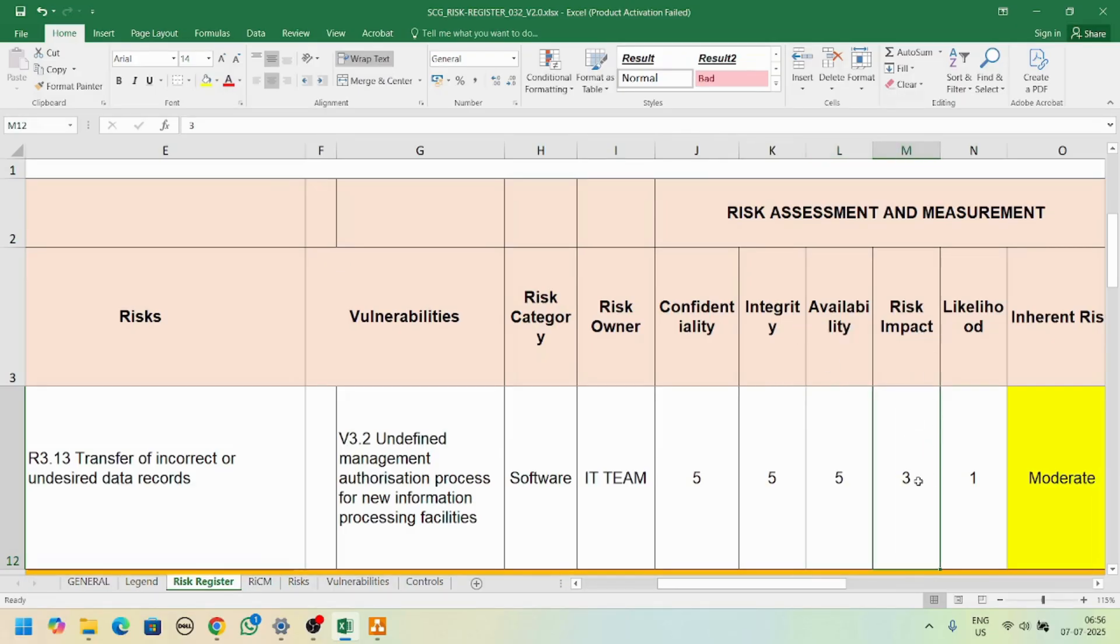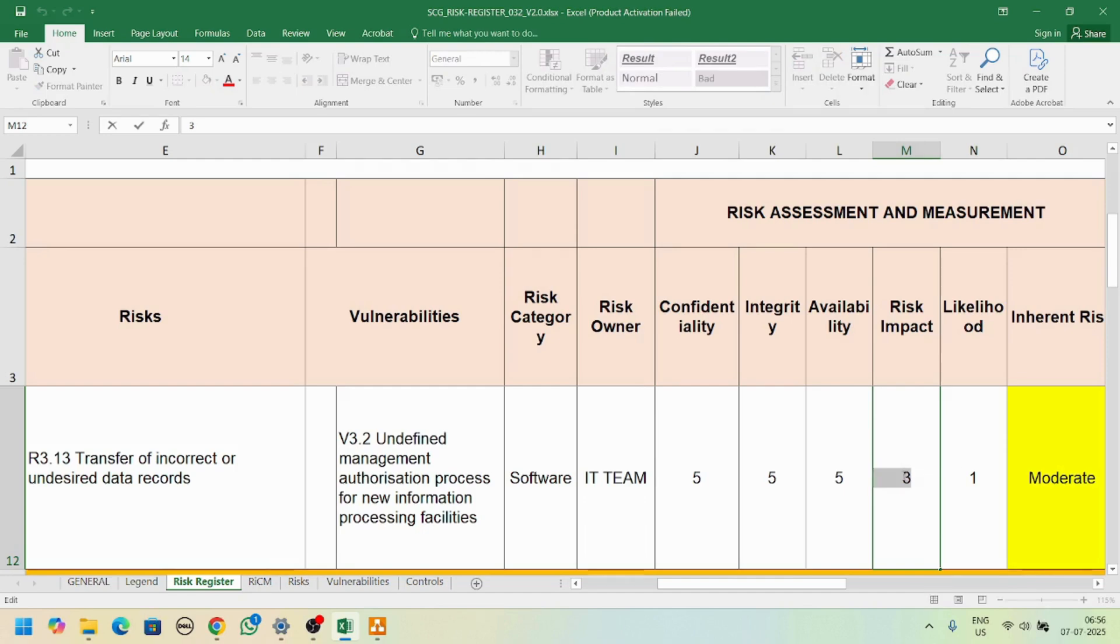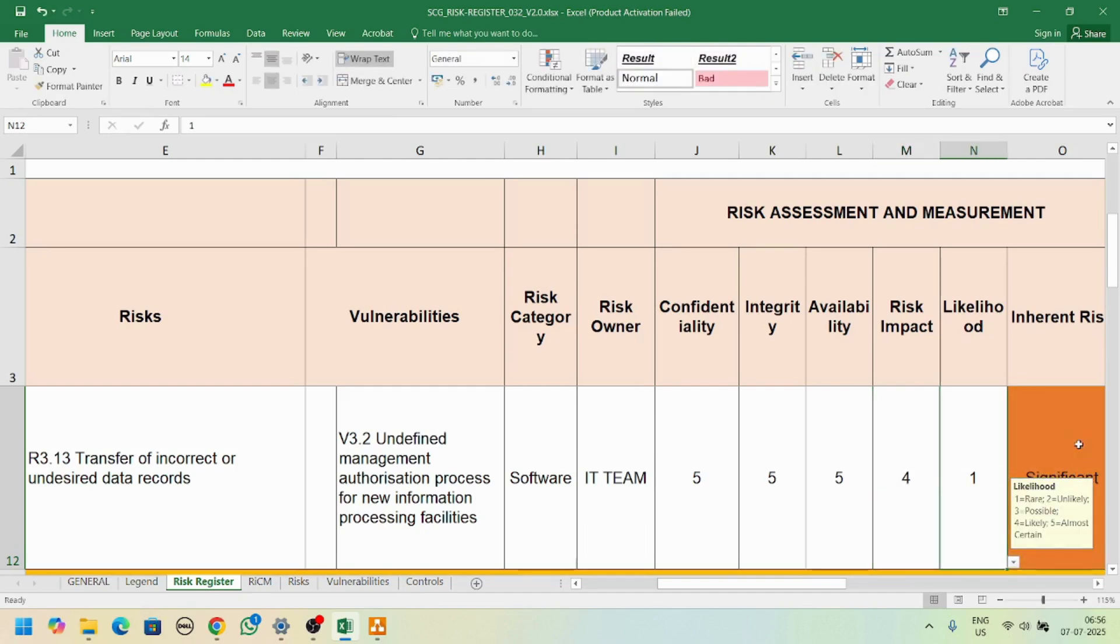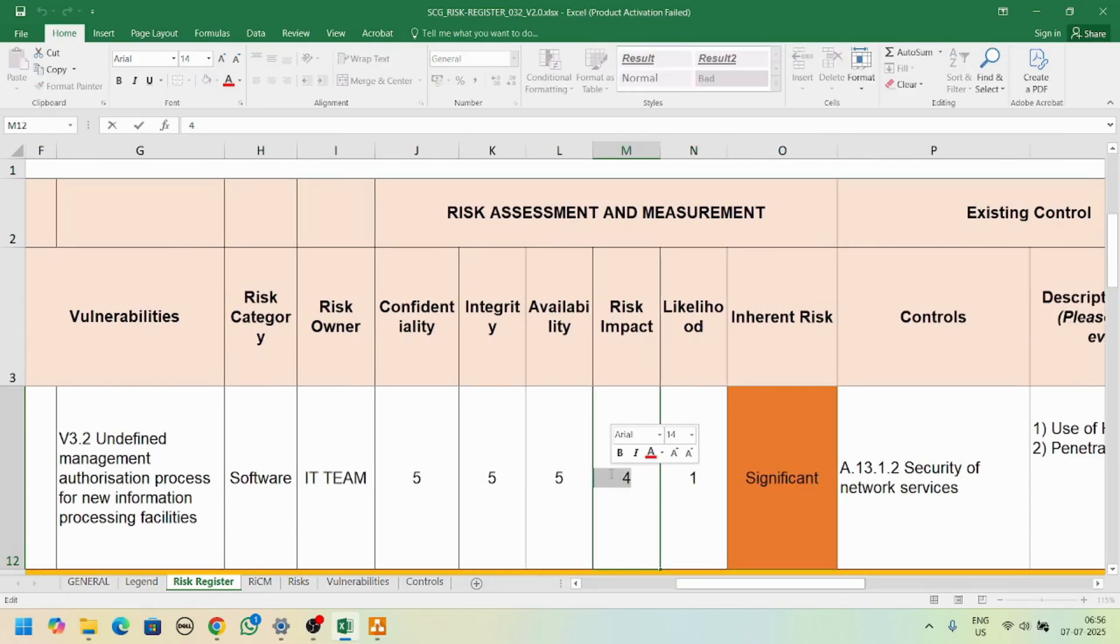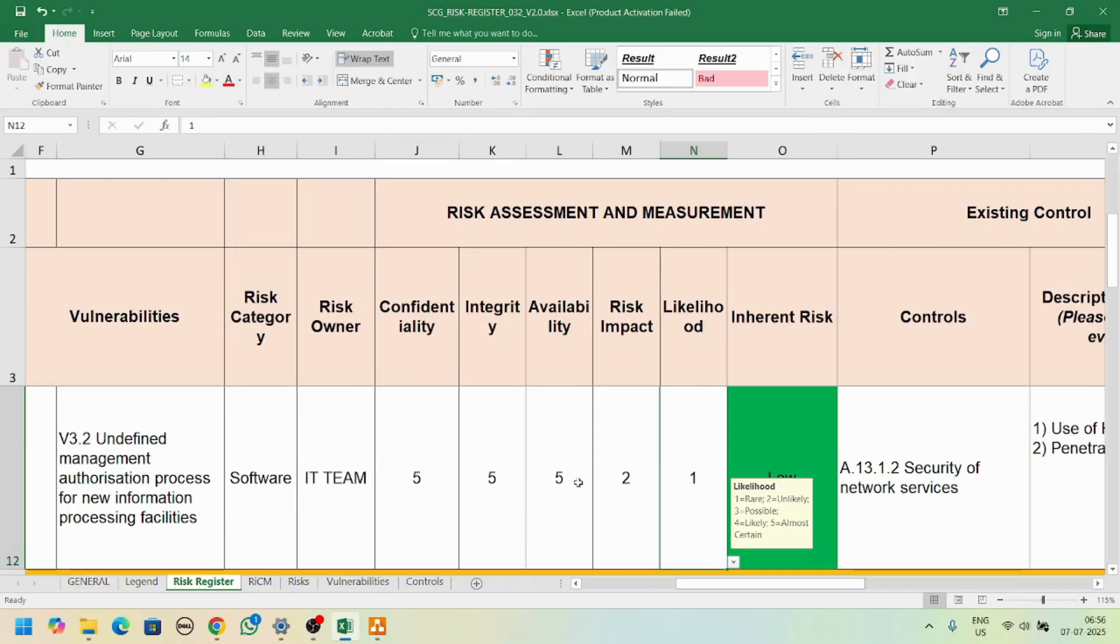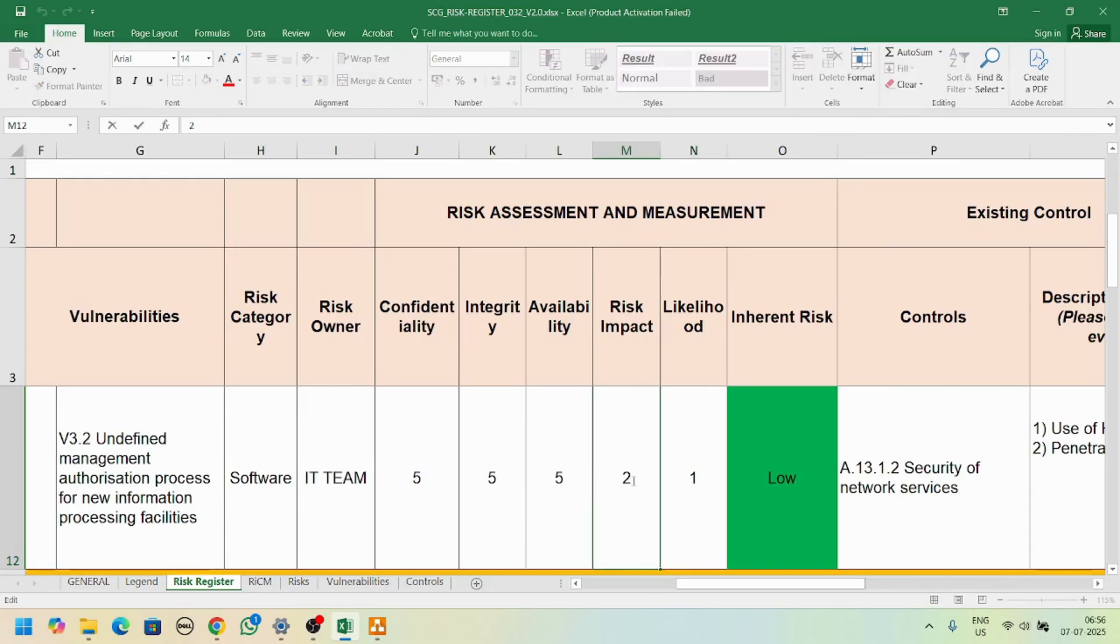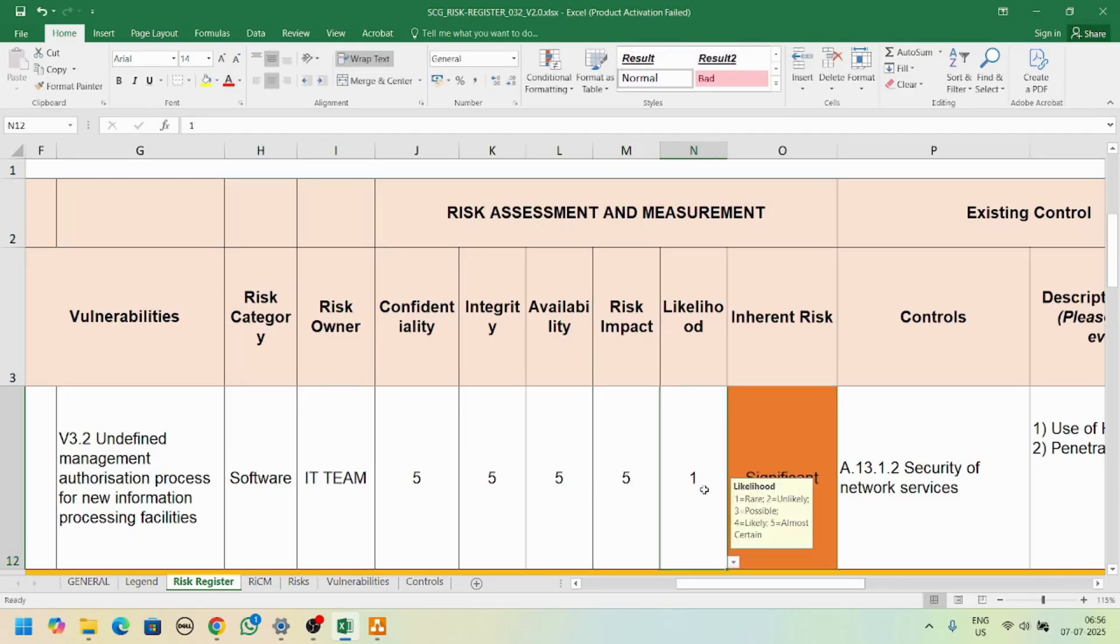The risk impact is out of five - you can give any rating from four to five. I'll give it a four, so see this will come as significant. If you give it a two, this will become low. This depends on the risk impact - the inherent risk depends on these values.